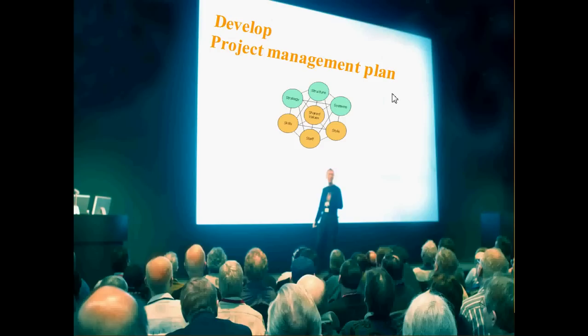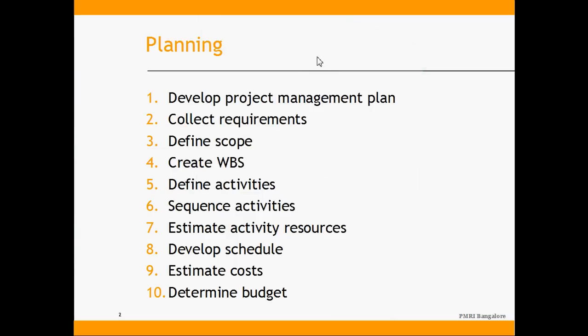Develop Project Management Plan is the first process under planning, performed by the project manager. Contrary to the belief that a plan is the schedule — a plan is not the schedule; the schedule is only part of the plan. A plan is a document comprising various sections: typically an MS Word document with team structures, roles and responsibilities, risk management, quality management, human resource management, and procurement sections. The schedule becomes part of this plan.